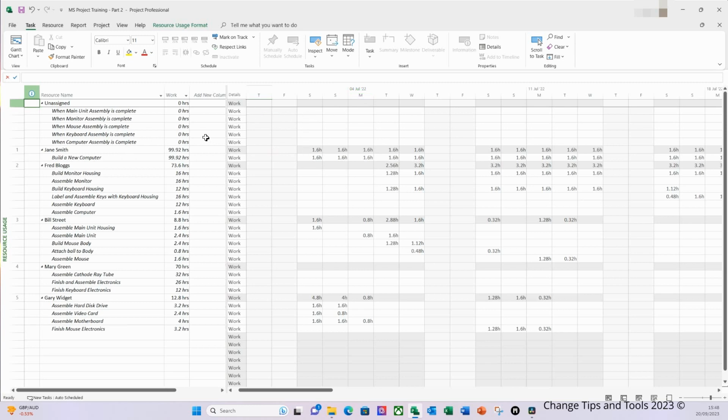What you can see over on the right are the hours, and we can see that there's no over allocations, obviously because the red icon indicator has now been removed based on us changing all these people to 20% allocation. You can, if you wish, make manual adjustments to the hours here also. Again, just be careful, and as you make these adjustments you can see the impact of those adjustments on the assignment here. You can also change the shape of your assignment.